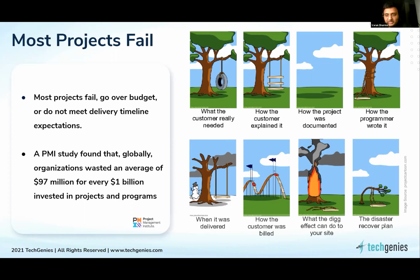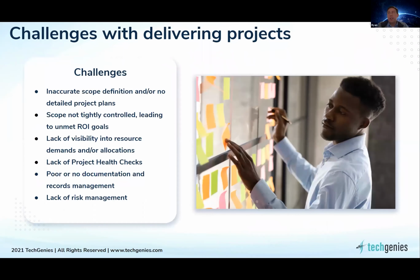And then one more thing I would like to add here is, I don't think any sort of reporting has been done in between any of the phases. So I think the executive team or the client, nobody knows what's happening in the project. So lack of visibility also is there. Otherwise they would have stepped in and asked to replan or readjust the project or the product. So lack of visibility, reporting, communication, documentation. I see all of these as root causes here. Perfect. Thank you for that. Let's keep talking about this area.